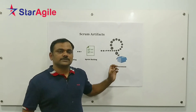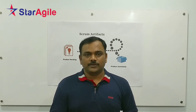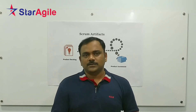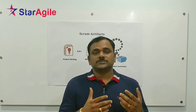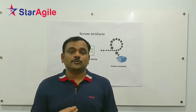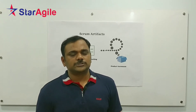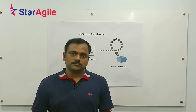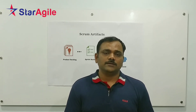The last artifact in Scrum is the Product Increment. Product Increment is a potentially shippable working software that the development team creates every sprint. The increment is the integrated product built so far — not just what was done in the current sprint. Something that is potentially shippable means it is ready to go to production, and the development team is expected to do everything required to make that feature good enough to go to production. You ensure that is happening using what is called the Definition of Done in Scrum. The development team uses the Definition of Done to ensure whatever feature they are working on is becoming potentially shippable, and anything that meets the Definition of Done and is potentially shippable is what is called the Product Increment in Scrum.